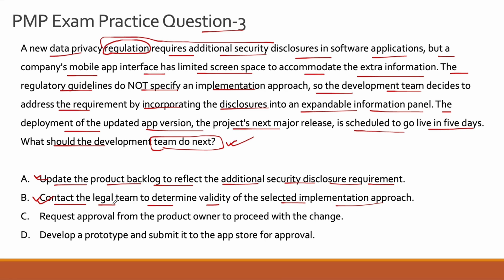So it's very important for you to understand that in this scenario, the proposal that you have provided as a product team to your regulatory team might not be acceptable. They might say that, look, the way you are disclosing this information in an expandable information panel is not acceptable to us, okay? You have to have it in a different way, maybe in the welcome page or maybe as a pop-up. So the problem here is that if as a project manager, you assume that the solution you are providing will be acceptable regardless because it is coming from you, this is not the right approach.